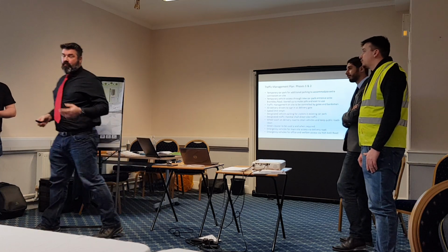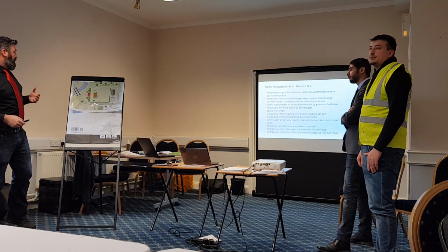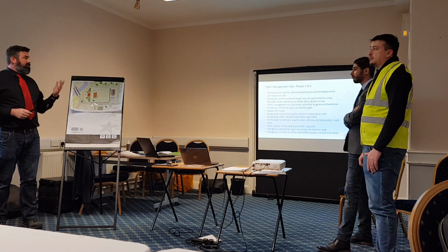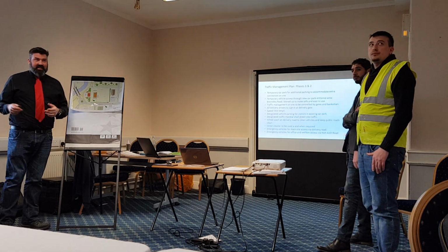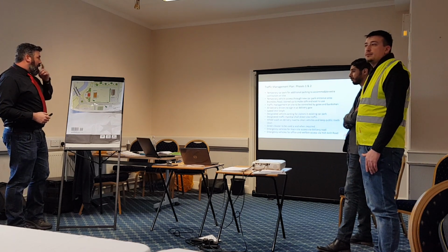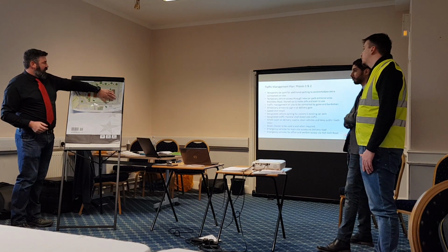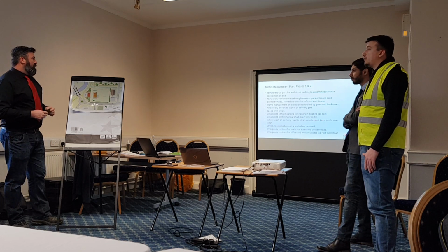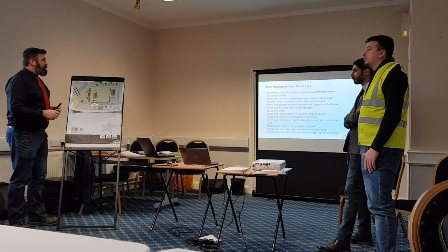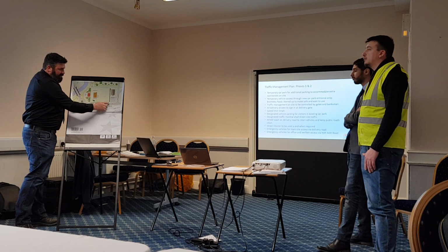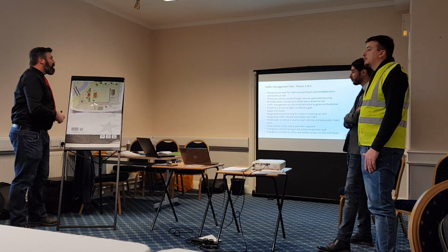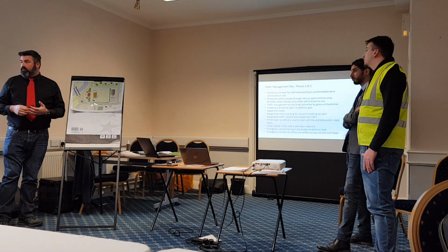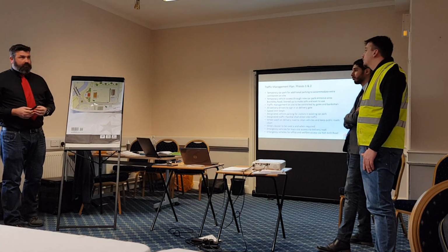So we have 3 phases of work, which means we have to have a bit of a mix up with the traffic management plan. So for phases 1 and 2, the traffic management plan stays as it is. We have a temporary car park on site in here for contractors. We've got temporary vehicle access, which will come through from the Bramley Road access, which we will make through here. Traffic management will be controlled by gates and vehicle marshal, banksman, and also signage.